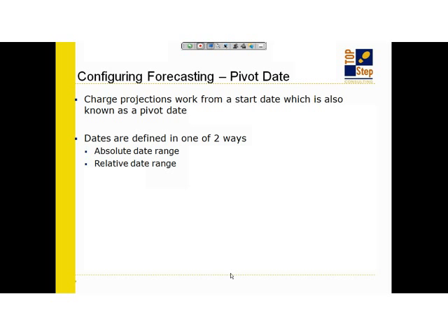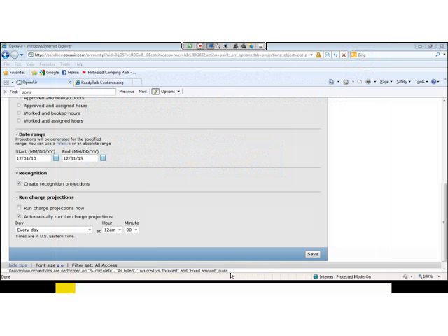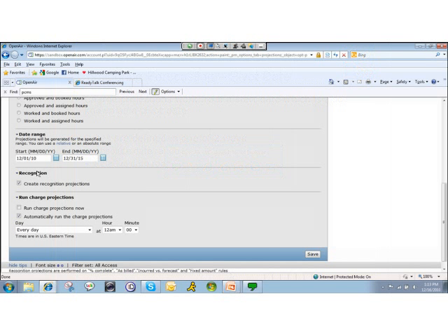Because you start using the system on September 17th, your forecast is as of the moment that you get OpenAir, September 17th. But there are other things to consider. There are other configuration items to consider. Specifically, you can set the start date to be something like the start of a week or the start of a month, and it would forecast from that point forward.